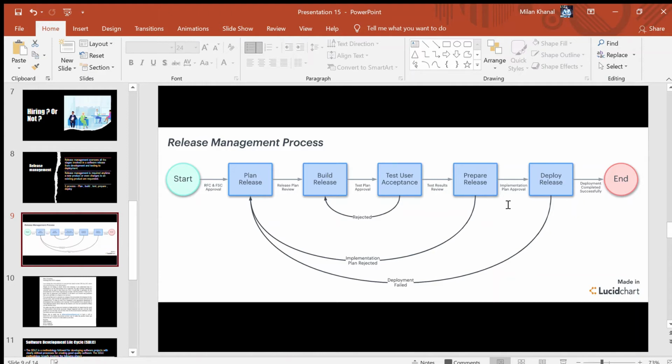So we can see in the plan release, it's about the foundation. In this foundation, we need to be prepared about defining your vision, ranking the product backlog, holding a release plan meeting, describing the roadmap, reviewing architectures, reviewing the velocity and iteration schedules, and defining things that could be done in the planning as well. So this is what is needed on the plan release.